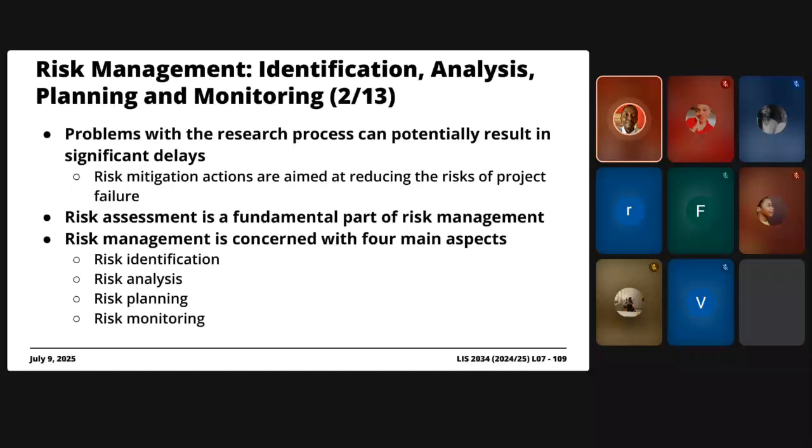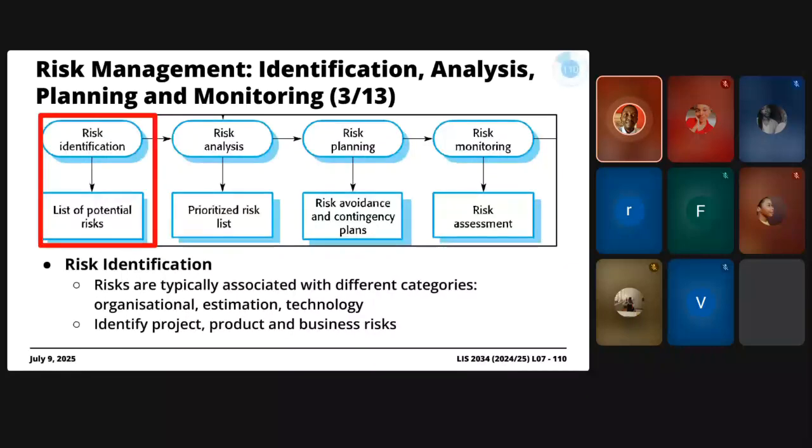We identified the probability scores of a risk happening and the impact that it will have. After 1 week, has the picture changed? What you begin to notice is that the impact and the likelihood will change as you progress through the project. Anyhow, so these are the key phases of project management.